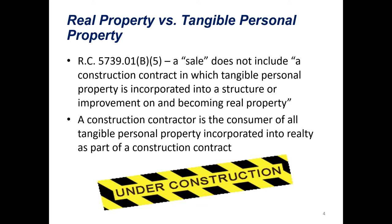ORC 5739-01 is generally written so that sales are presumed to be taxable. From there, it states certain sales that aren't taxable and creates certain exemptions. What we're going to look at today is Revised Code 5739-01-B5, which states that a sale does not include a construction contract in which tangible personal property is incorporated into a structure or improvement on and becoming real property. So if you have lumber and you incorporate it into a structure—you build a house—that house is real property, so the wood incorporated into it is not a taxable sale to the contractee. ORC 5739-01-B5 goes on to state that the construction contractor is then the consumer of that tangible personal property incorporated into the realty. When the contractor buys the lumber, they're charged tax on that purchase.